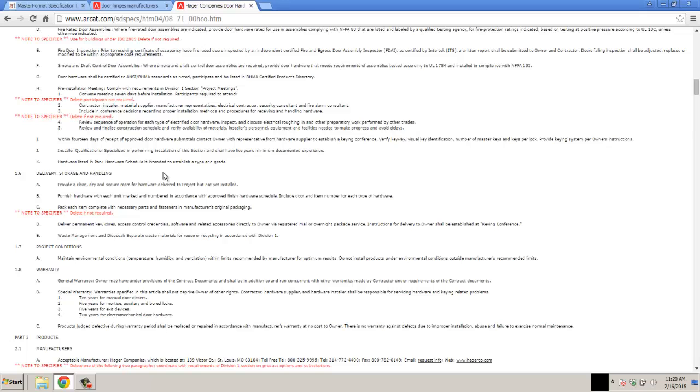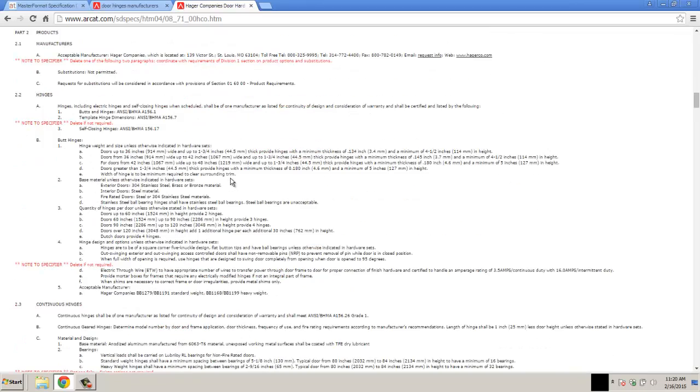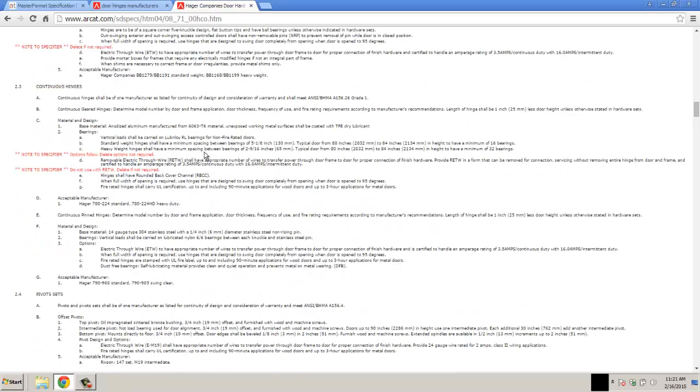All of this information is important. And everything that comes to the job site needs to be signed for. So if you can't find it, you have somebody that signed for it. Hopefully they'll be able to find it for you. And that's why it's important that this material is ordered and delivered in a fashion that it doesn't come to the site before it's needed, so it just sits around for weeks or months. It shows up on the job site when it's ready to be installed. It's not late. It's not holding other people up. So this ability to get things on the site at the right time is very important in the scheduling aspects of it. But everything has its own specification.